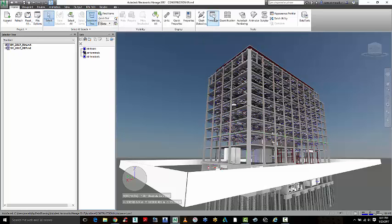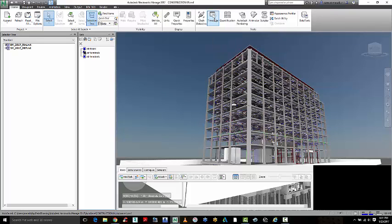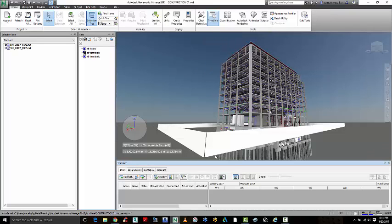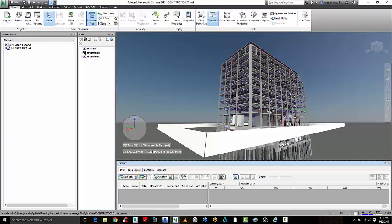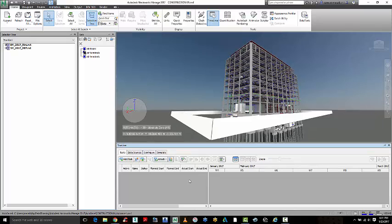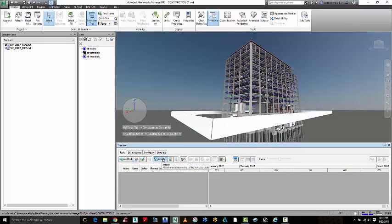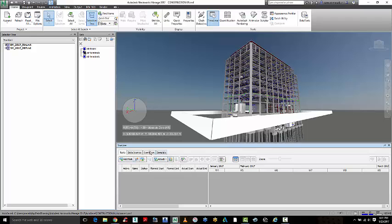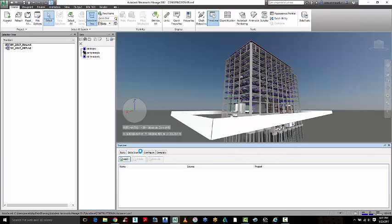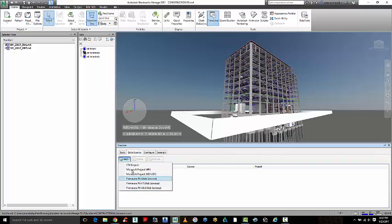I'll also go over Timeliner and how you can work with Timeliner to do simulation of a construction program, so you can actually bring in a construction program from another file format. Maybe you're bringing it in from Primavera or another data source; we have several different file formats that you can bring in here.